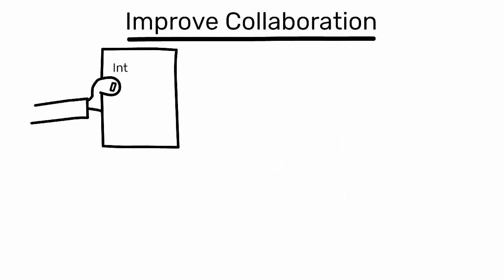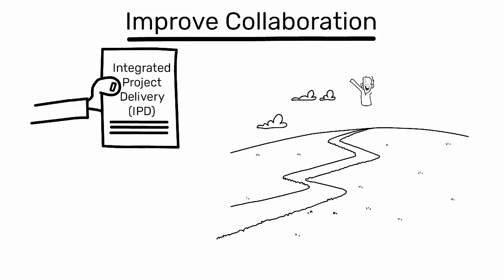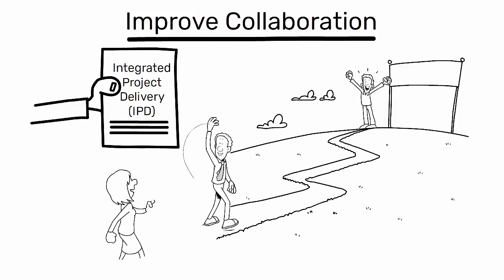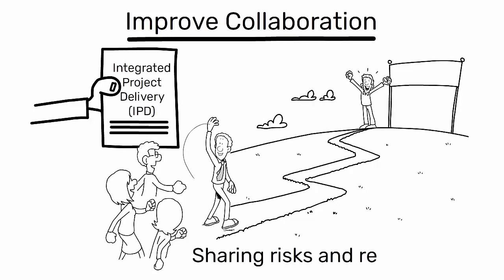Seventh, improve collaboration. Use integrated project delivery (IPD) or other collaborative contracting methods to ensure that all parties are working towards common goals and sharing risks and rewards.